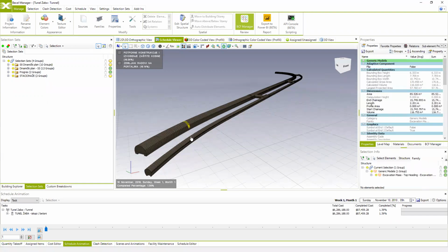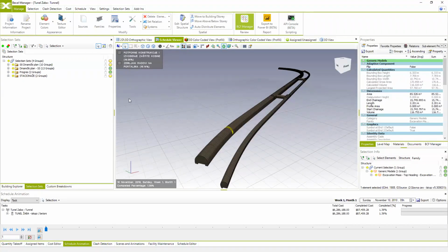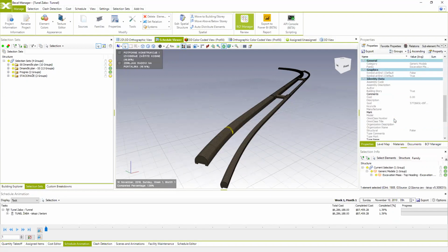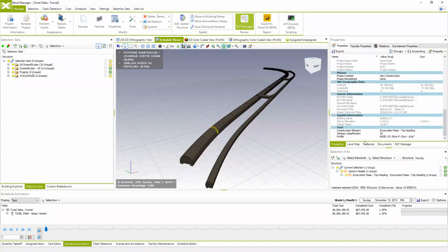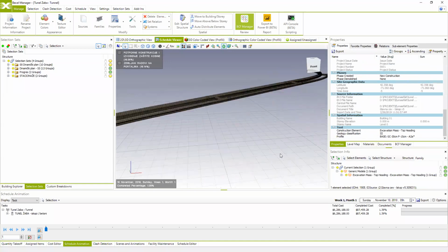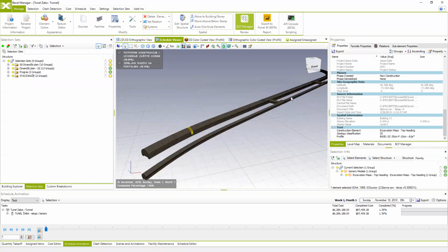In this case, for let's say an infrastructure project, we used properties which have a profile and a value for this profile, which are actually the chainage, or the parts of your infrastructure project, or parts of your road or railway or a tunnel.